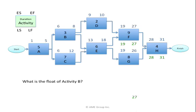Moving to activity G — the latest G may finish is day 27 for H to start by day 28. The latest G may start: 27 minus 8 plus 1 equals day 20. For activity D, the latest D may finish for F to begin on day 19 is day 18. If activity D is 2 days long, the latest it could start would be day 17: 18 minus 2 plus 1 equals day 17.